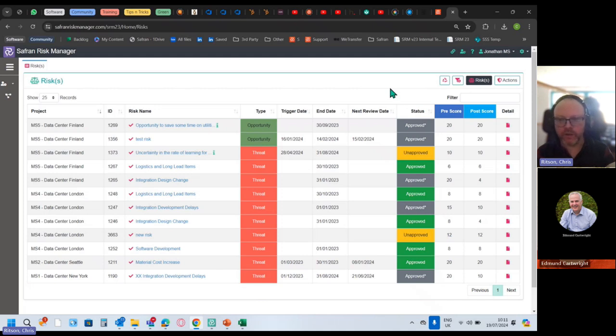It also has a thing called a global risk register, but in any case you have to start off the life of the risk as being an unapproved risk. Someone has to have been delegated the authority to become the risk owner to assess that risk, and only after they've gone through the steps of assessing the validity of said risk in the context of the scope of that project. And we talk a little bit about the roles.